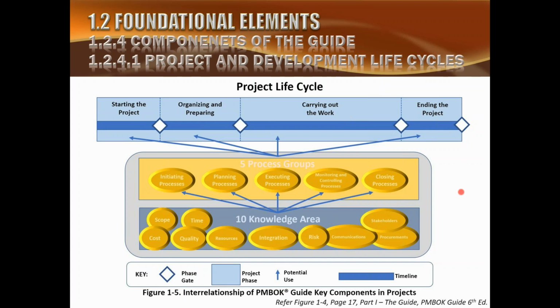While we are doing all our project in these phases, we will be using the knowledge of project management. As far as the project management processes are concerned, the 49 processes, certain processes will be used for initiation, certain processes in planning, execution, monitoring and control, and closing, and those will be applied to each one of the phases separately. Because every phase is like a small little project, and every phase has to be initiated, planned, executed, monitored and controlled, and closed.